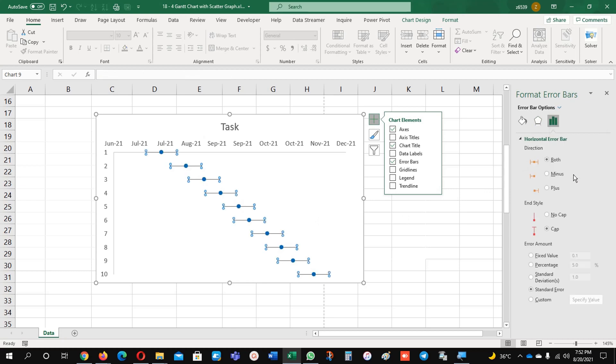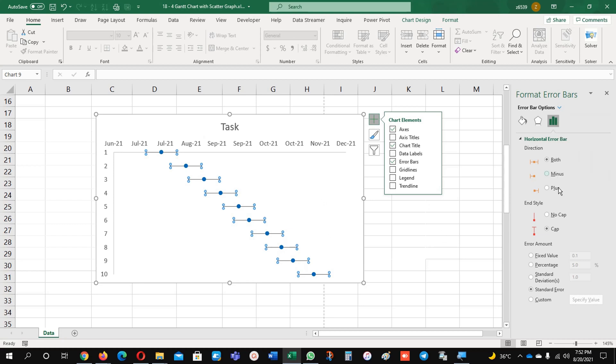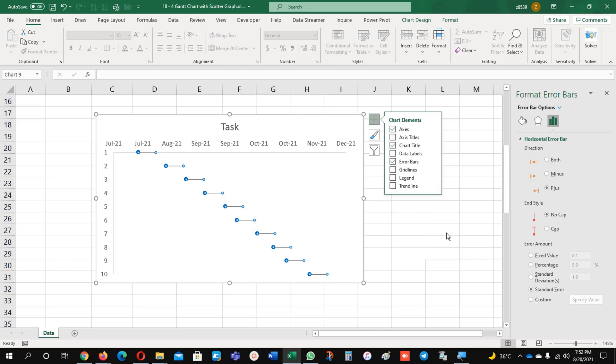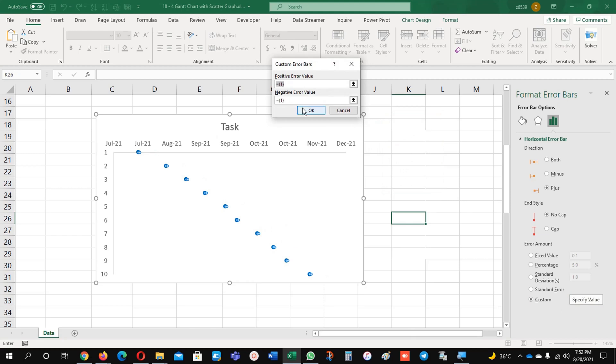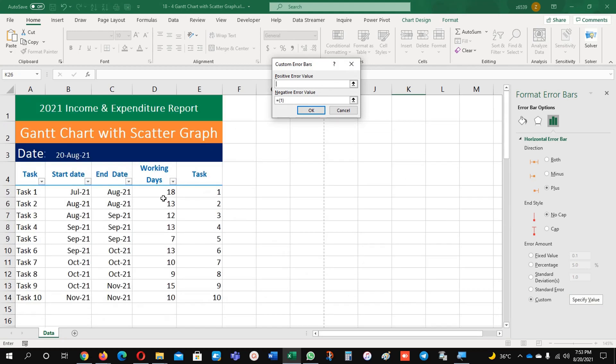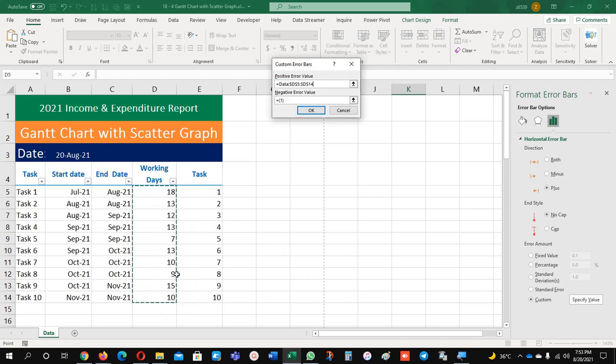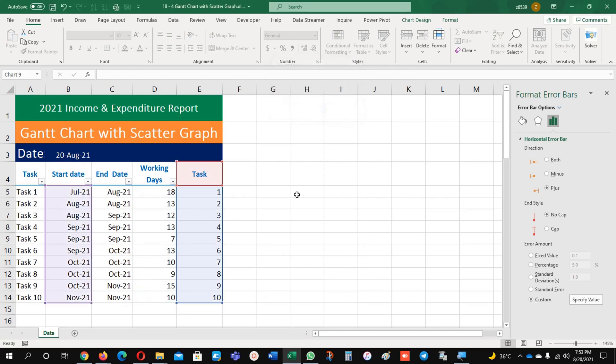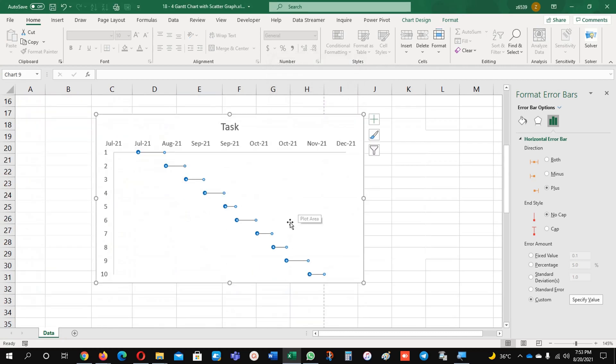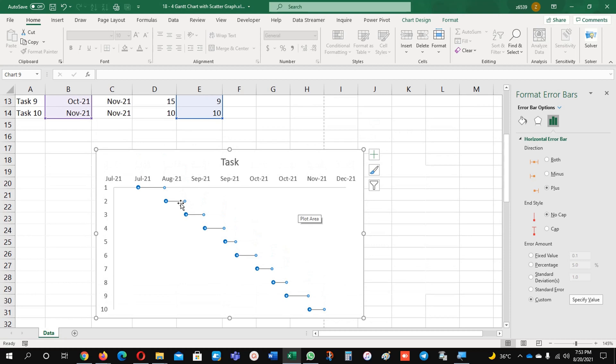And now I'm just going to click anywhere on the chart. You can select from here as well. Now you can see what I did - I selected the task series x-bar and it is showing me this one. I will add the plus sign, no cap. And for the duration, I will select custom, specify the value, and from here I will select these working days. Now it's there.